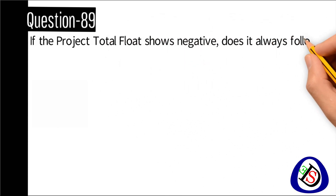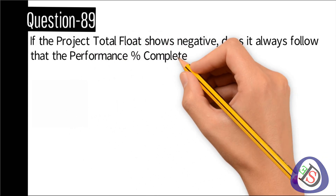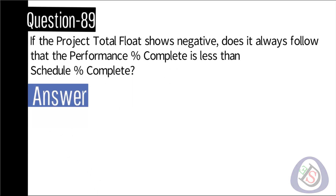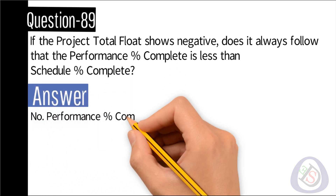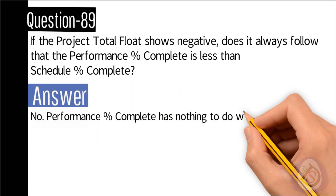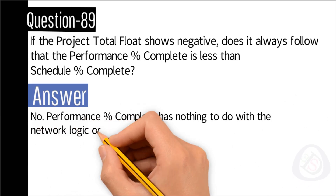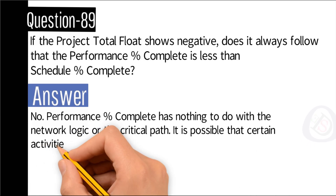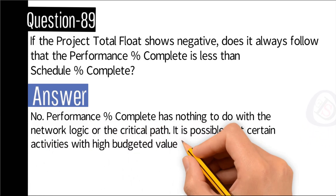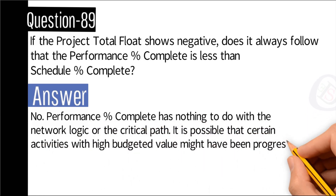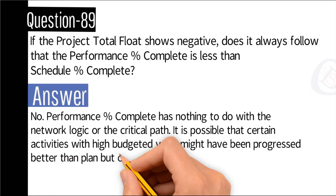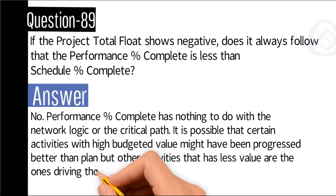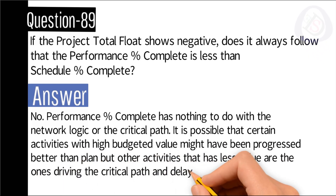Question number 89: If the project total float shows negative, does it always follow that the performance percent complete is less than schedule percent complete? Answer: No. Performance percent complete has nothing to do with the network logic or the critical path. It is possible that certain activities with high budgeted value might have been progressed better than planned.